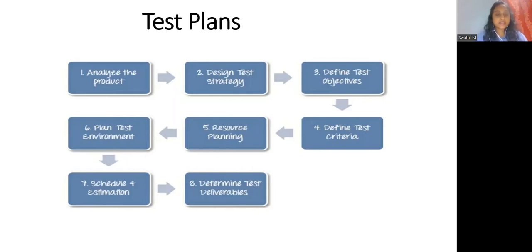Let me tell you another example, identifying the testing type. It is a standard test procedure that gives an expected test outcome. Commonly used testing types are unit testing, API testing, agile testing. So there are many testing types, we know, right? For testing a software product, we cannot have enough effort to handle all these kinds of testing. So we must set priority of the testing types: which testing type should be focused on for web application testing, and which testing type should be ignored for saving cost. So the third is documenting risk and issues.